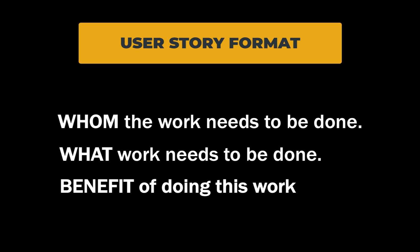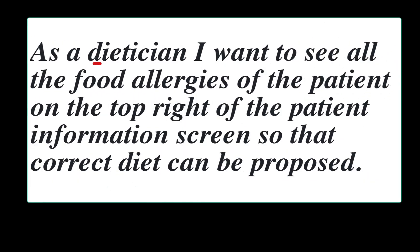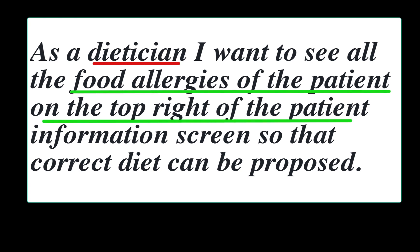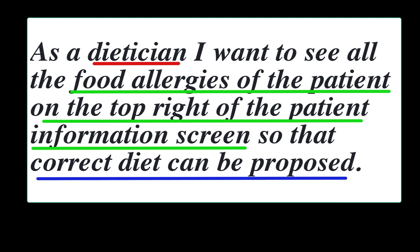Putting all these together will form a user story. Looking into the previous example: dietitian is for whom the work needs to be done; displaying food allergy on the top right of the patient information screen is what needs to be done; and proposing the right diet is the user's benefit from this functionality.